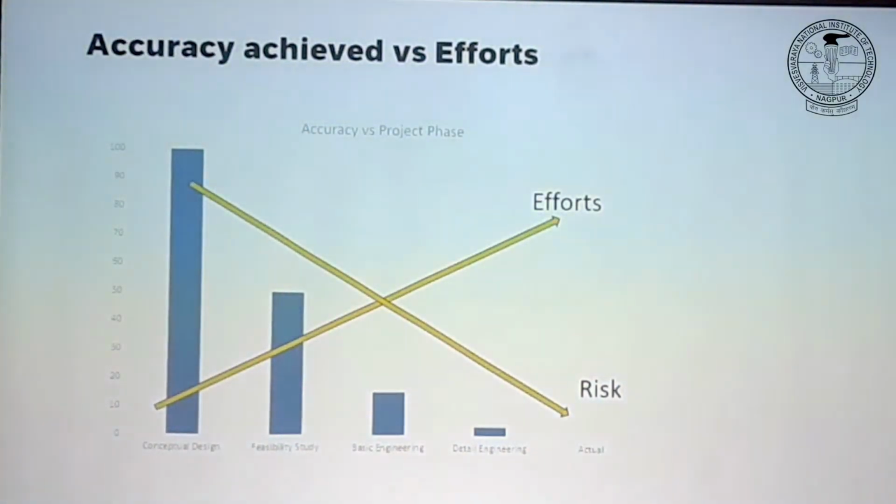But you started digging deeper and understanding how you add components A and B. Suddenly you realize, oh, I need component D as well, which costs not 20,000 but 30,000. Right? So this assumption in the beginning, that other things which I don't know yet will cost me 20,000, can go wrong drastically.